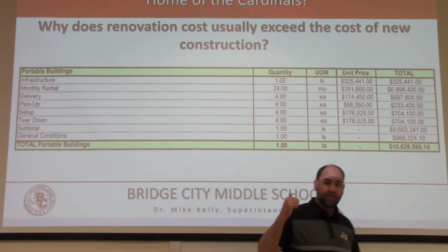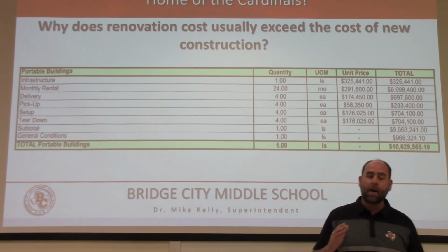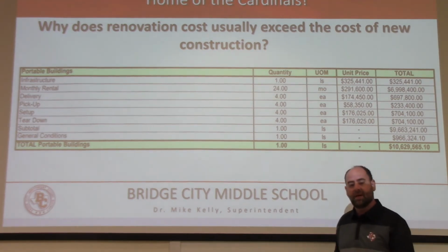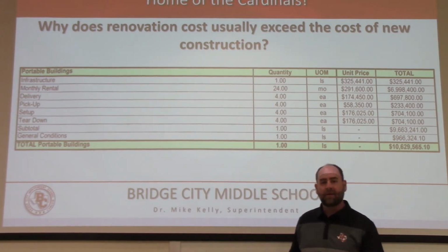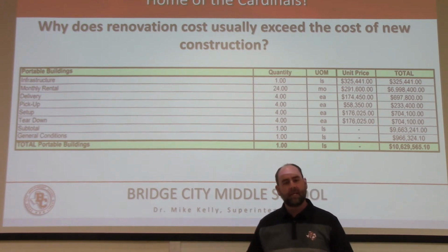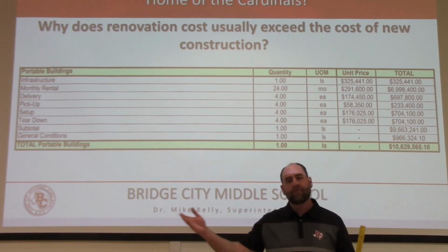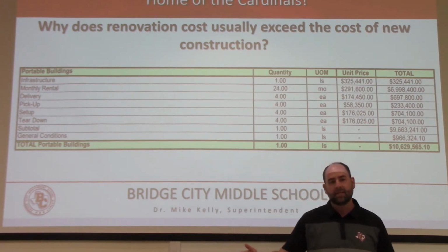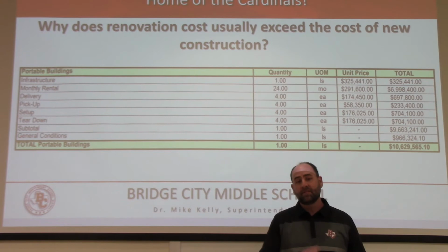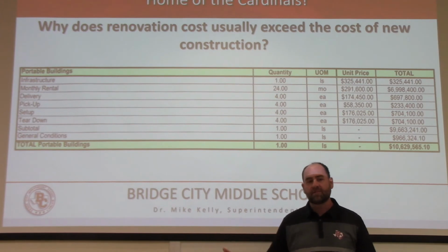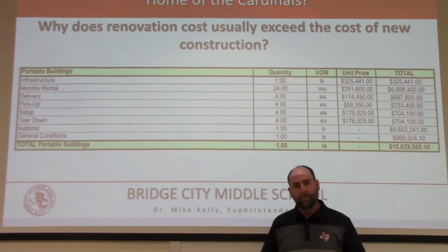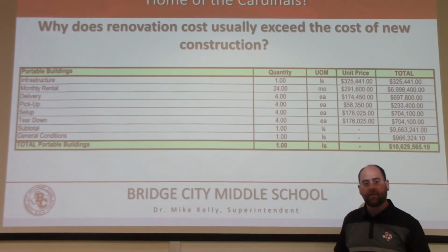These renovations, the renovation list that I just went through, there's no possible way that those renovations could be done on weekends or over a summer like some have alluded to. There's no possible way. Our faculty, our staff, our principals, our counselors, our teachers, we are hosting summer school. Our 226-day employees essentially get about a week and a half off in the summer. That is what their summer is. And other than that, we're educating students, we're finishing up a school year, or we're getting ready to educate students in another school year. So to say that those renovations could happen over the summer or over a weekend, not possible. And so we have to get students out of those buildings.